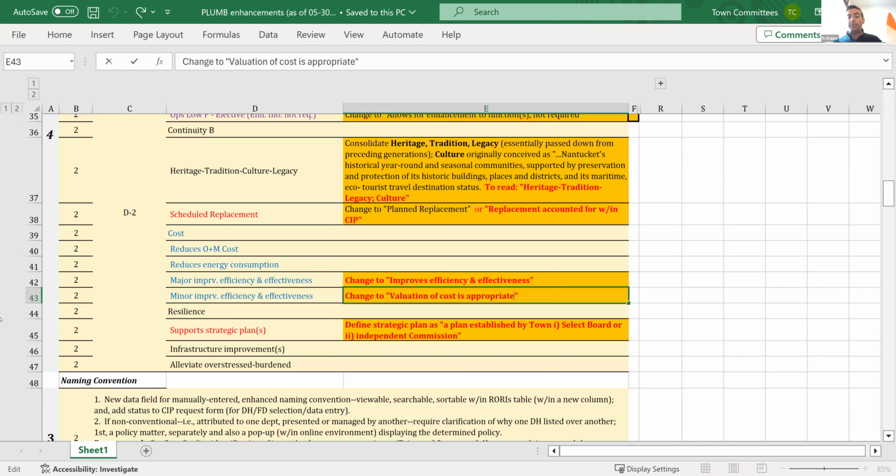So I don't know if that's also what this is trying to solve, because obviously it would incentivize department heads to provide as much documentation as they can, knowing that a line item is based on how detailed the estimates of the costs are. And different requests are going to have a different spectrum of how much documentation might be required to meet 100%. But I think that is also correlated to how complicated and how high cost those projects are. An F-150 would probably be a quote from whatever auto dealership, and a $10 million housing project would require a litany of budgets and additional backup documentation.